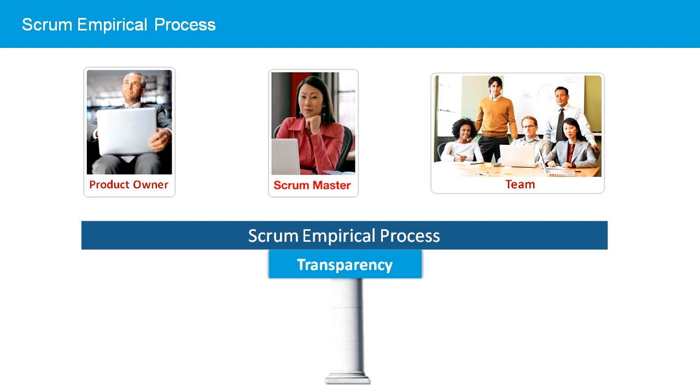In the sprint review, the customer receives a demonstration of the product increment, the working software in a deliverable form. The visibility afforded in these reviews allows the customer to give feedback as the product is being developed, allowing adjustments to ensure the final product satisfies the customer.